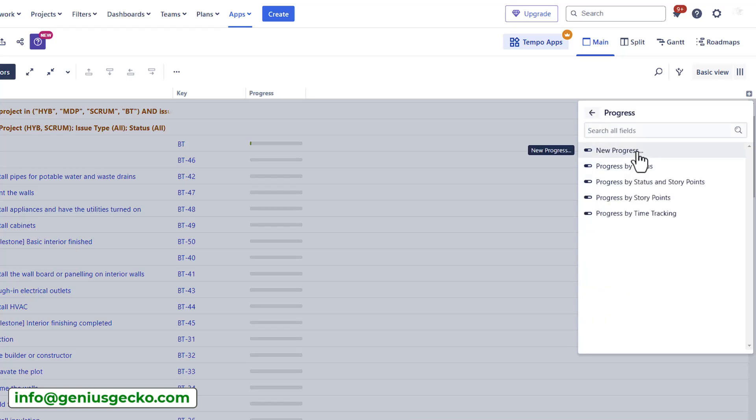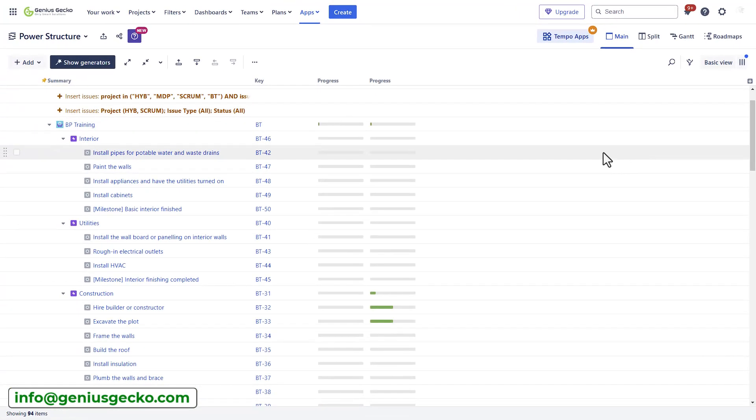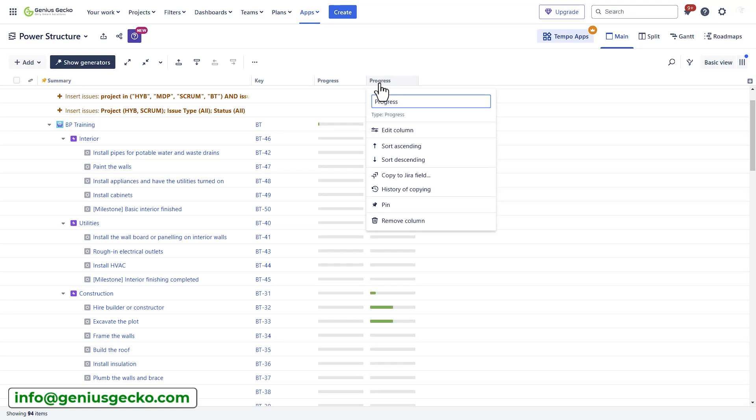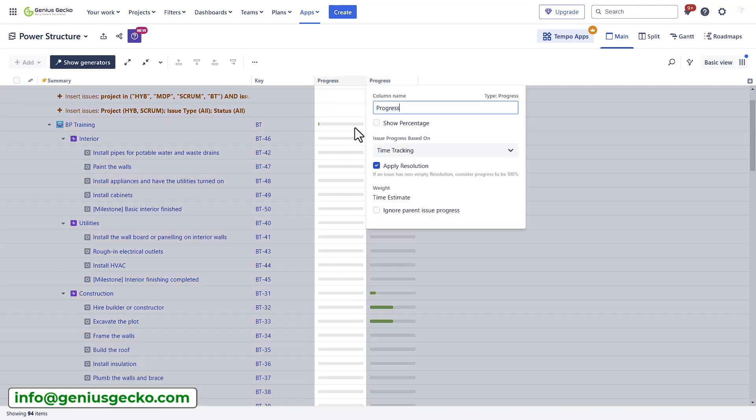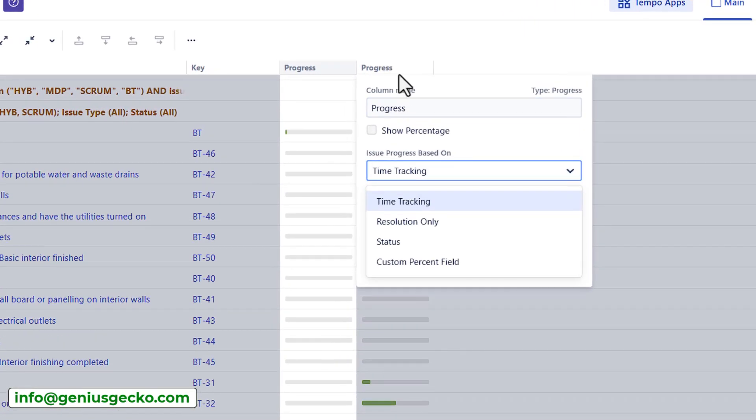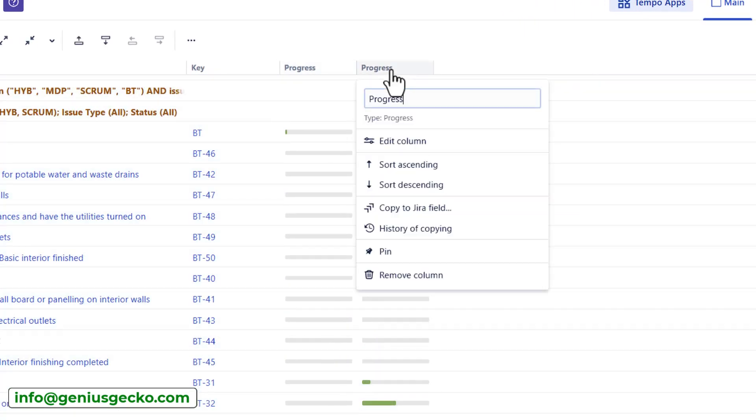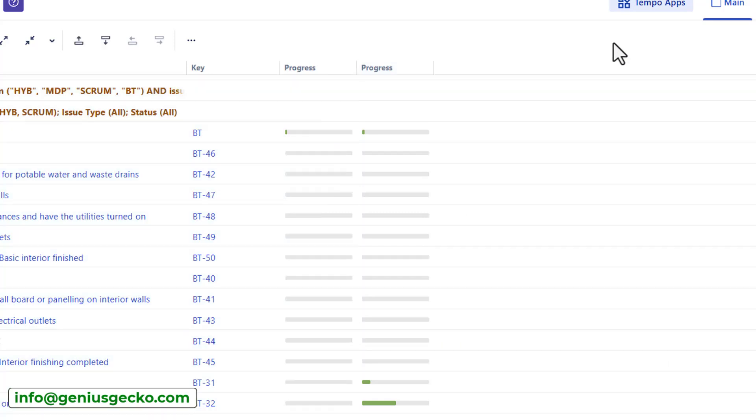Let's add a progress field, maybe progress by status. Let's start with progress by status. We have two progress already added. Now I have one type progress, the other one type progress, but they show different values. This one actually uses time tracking, while the other progress uses status field. As you can see, depending on the data available in my JIRA, these progress bars can show different values.